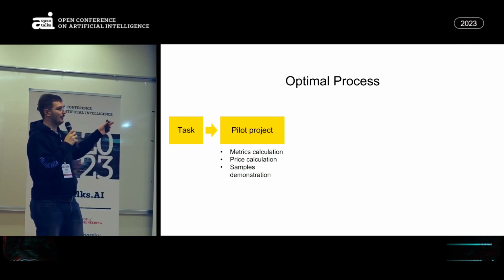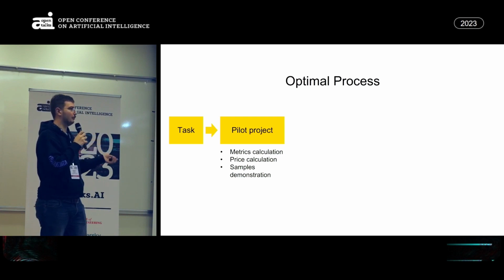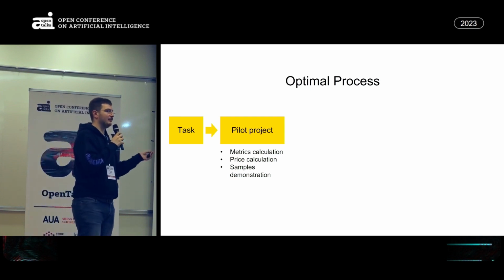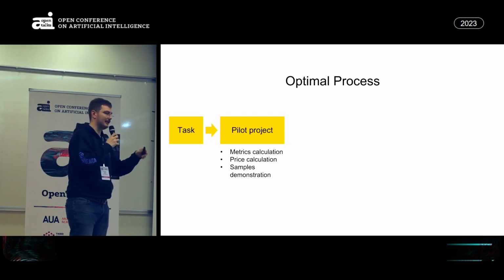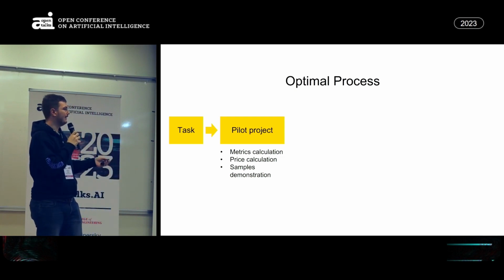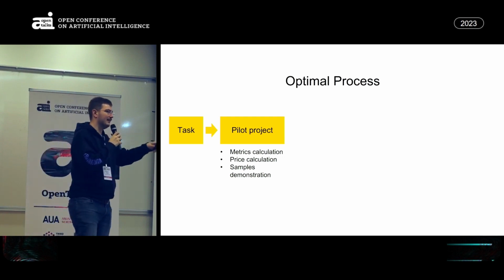Depending on your data volume, you can already estimate how many man-hours you'll need, what your labeling team should be like, and roughly how many days it will take. If you know the cost of an annotator's hour, you can already estimate the labeling budget. This way, without labeling any data yet, you can already plan your budget for data labeling.